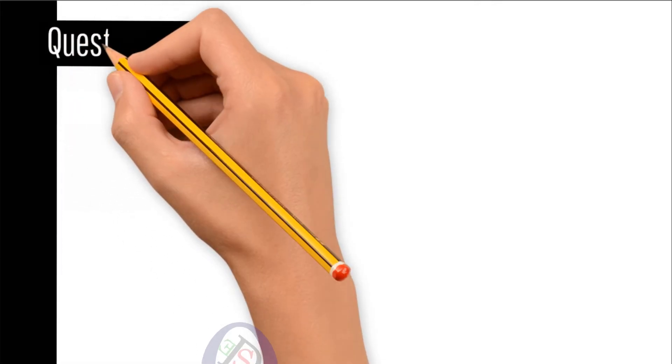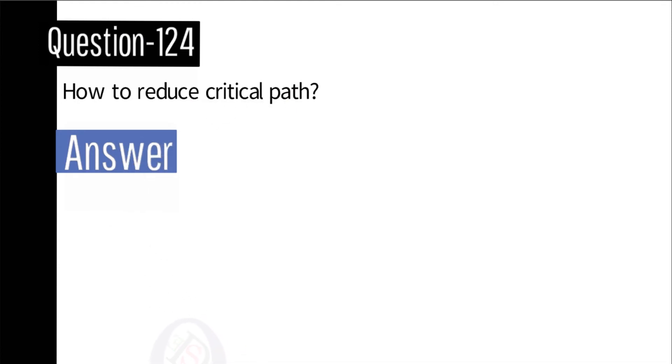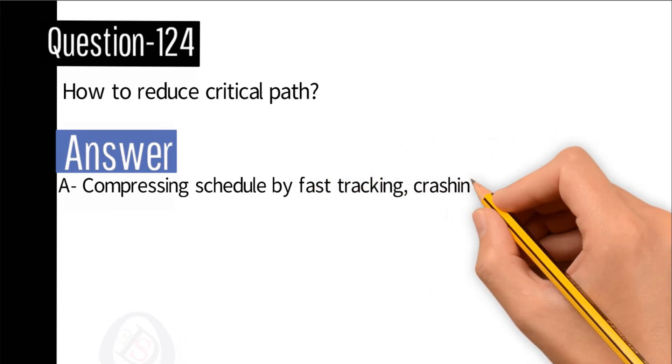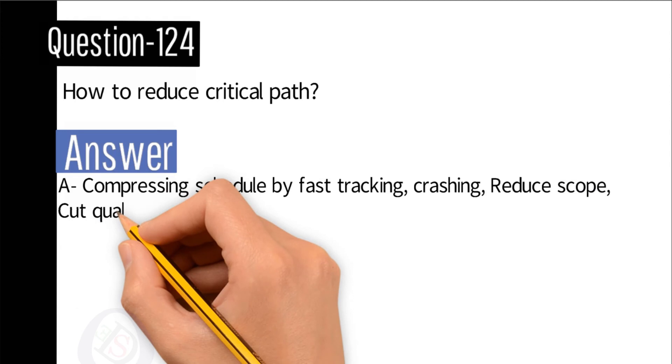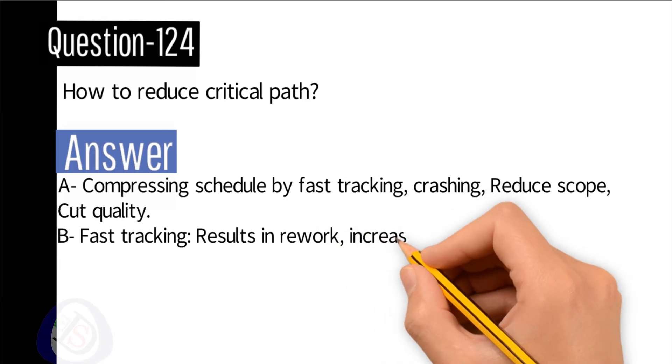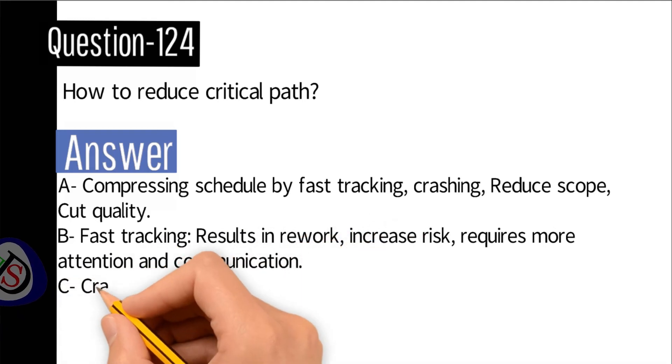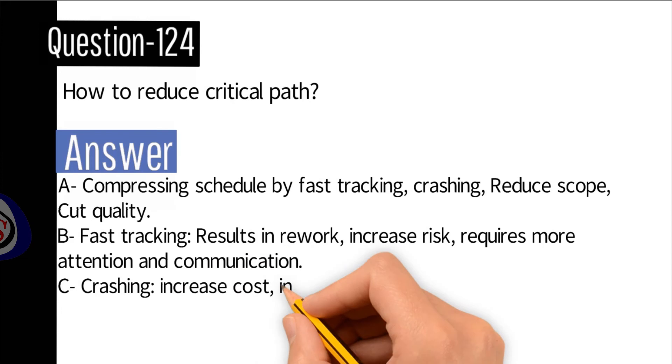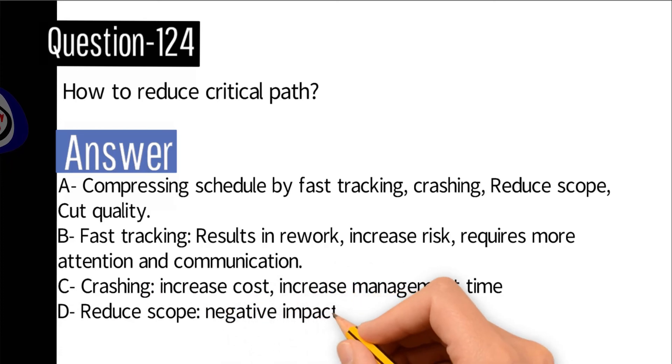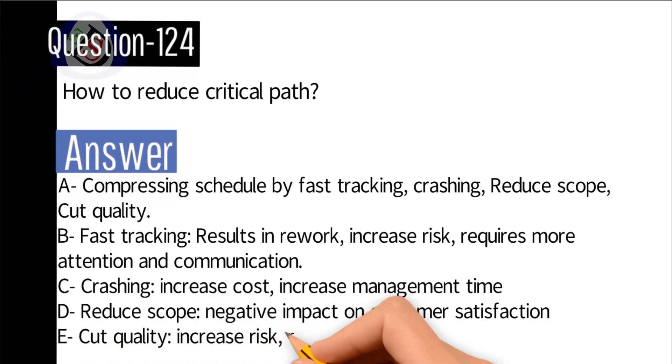Question number 124: How to reduce critical path? Answer: A) Compressing schedule by fast tracking, crashing, reduce scope, cut quality. B) Fast tracking results in rework, increased risk, requires more attention and communication. C) Crashing increases cost, increases management time. D) Reduce scope has negative impact on customer satisfaction. E) Cut quality increases risk, requires good metrics.